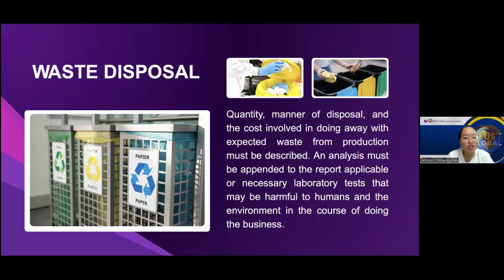In terms of waste, 20 kilograms per month of plastic scraps and failed prints. In terms of disposal method, waste is sent to a recycling facility for $50 per month. In terms of safety analysis, we have to ensure no harmful fumes or residues are released by regularly testing air quality in the workshop. So this plan ensures compliance with safety and environmental standards while managing the cost effectively.